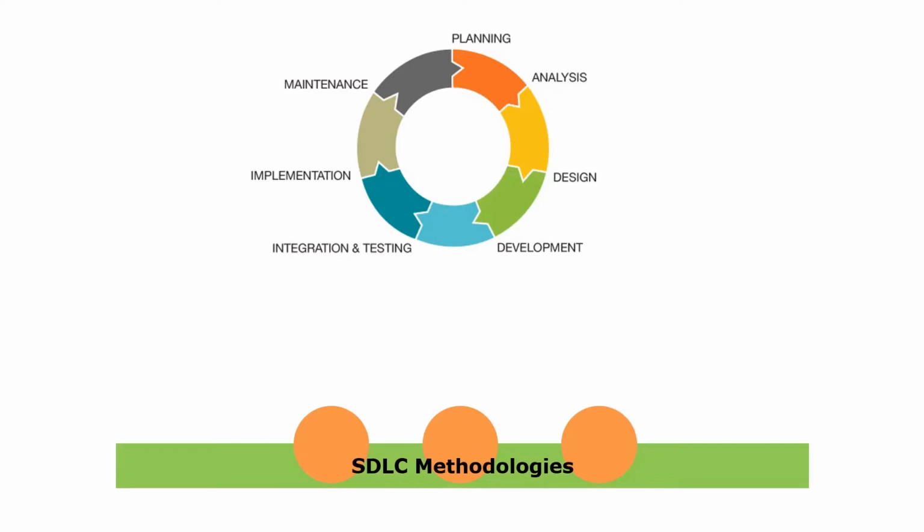Now the major issue here, why the waterfall cycle fails to attract so many companies, or why it became a major setback, is, if you can see, all these processes are there. The one biggest problem in the waterfall cycle is you cannot move from one process to another before finishing the current one. Meaning, if you are in the design phase, you can move to development only when you complete the entire design part. Now this is where the problem comes.